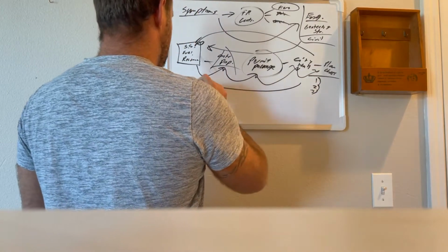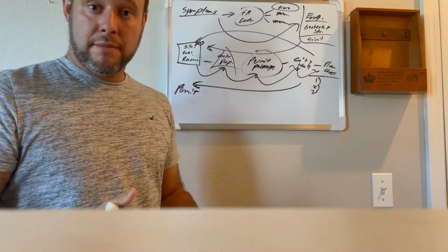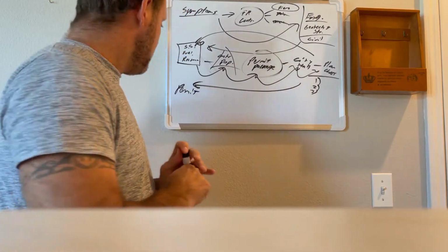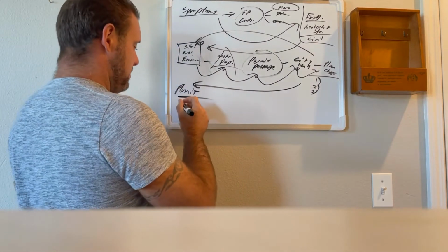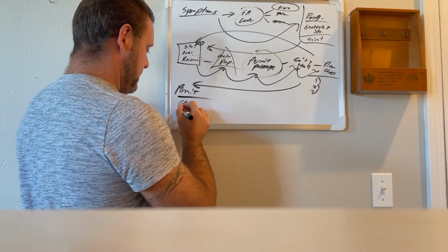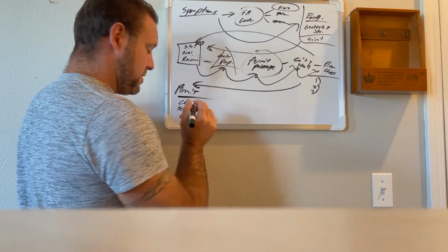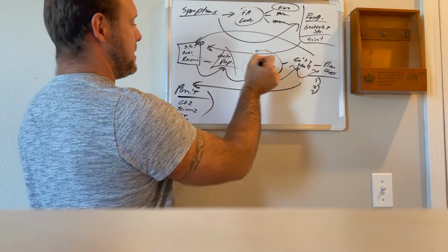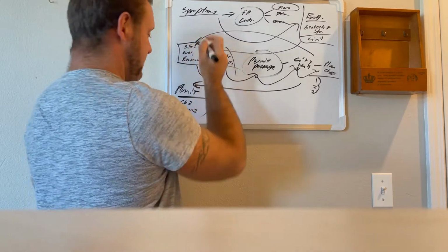All right. Once here, you're going to have the permit. Yay! It finally gets issued. By the way, you paid a plan check fee. Usually there's also a permit issuance fee. You need to review the permit for any special conditions. That's going to be your CO2 alarm, the seismic gas shutoff valve, and special inspection, which is all an additional cost, right? Generally not included in the contractor's contract, nor is it included in the engineer's scope of work, generally.